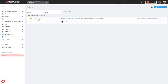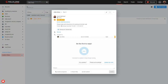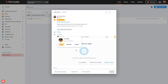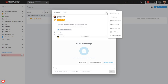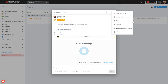If I'd like to go ahead and view the post, I can click to open this post. I can see the information that I placed in here earlier. I can see Carrie and mark her either resolved or closed. Carrie as an assignee is going to be able to mark herself resolved when she views this post — to say hey, I've completed the action that I need. And then project organizers or the post creator will be able to come in and mark her as closed, verifying that those actions have been taken. We can also reply to this post, ask questions, add responses, have a commentary back and forth. And as a project organizer or the post creator, I have the ability to update who's assigned, attach additional files, add weather. I can come up here to the edit button and it's going to allow me to edit all sorts of information about this post. And then you've got your more icon with those same options we saw.